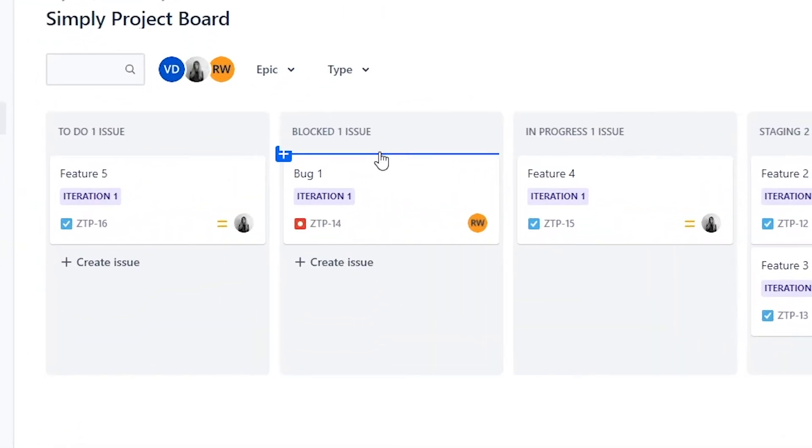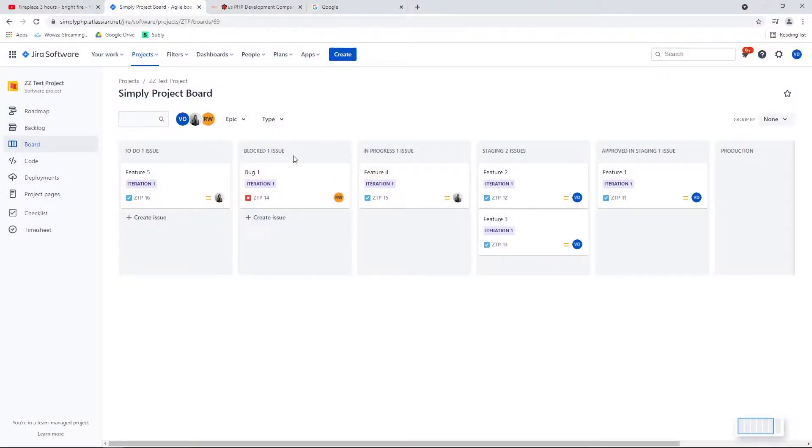So 'blocked' — let's say I'm working on something, and bug number one, ticket ZTP-14, I can't replicate it, so that's why I'm blocked. I need to ask the client to give me more information or to provide the exact steps they did, so we can try to replicate that bug in different environments. So the client's saying, when I click on this and that, this bug is happening, and when we do it it's working as expected — that's when you put it into a blocked issue.